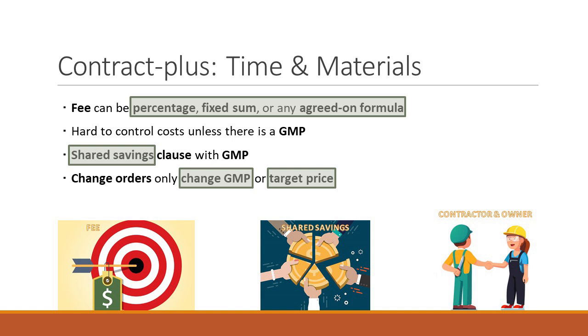And the contractor says, well, let's do what's called a shared savings. For every dollar that I come in under the $1.1 million, we split it. You give me 20 cents, you keep 80. So let's say at the end of the project, it comes in at $1 million. Well, the owner pays them $1,200,000 because there's that 20%. It's free money of $200,000 to the contractor because he only spent $1 million. But the owner had a little bit, but maybe not the best deal there.